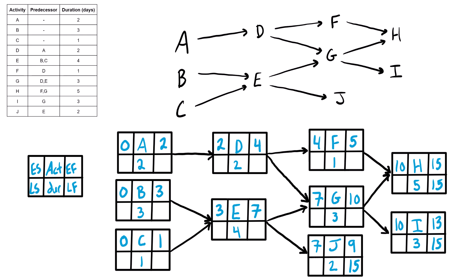Now we work backwards doing our backward pass, which is basically the opposite of the forward pass — we subtract the duration. Fifteen minus five gives a late start of ten for H. Fifteen minus three gives a late start of twelve for I. Fifteen minus two gives a late start of thirteen for J. We bring the late start into the late finish of the predecessor: the ten goes into F, and ten minus one is nine for F's late start. For G, there are two successors, so we bring the smaller of the two values — ten or twelve — we bring ten in and subtract the duration to get seven.